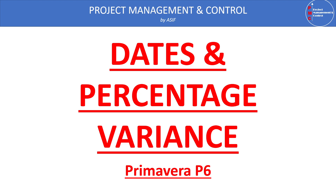The acceptable variance range is agreed upon with the client and consultant, so that it will not cause the project to be delayed. However, if the activity is not finished as scheduled and it is on the critical path, any delay in the completion of that activity will directly impact the completion of the project.